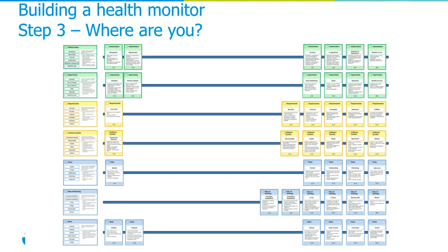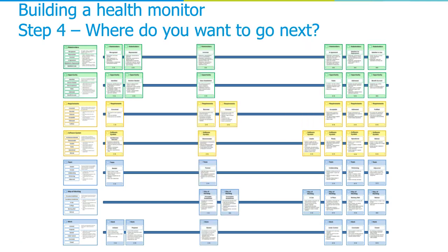And once we have settled on where we are, we discuss what to do next. And we go to the right, look at the cards to the right and say, this is what we are going to do next. You take one row after the other and identify what should be the next sprint, for instance. And the cards in the middle here represent the target. This is where we want to get next. So another discussion that helps the team have consensus. And it can also be a discussion where you have the team talking to a project manager and agree on what to do next. So it has shown to be very helpful.